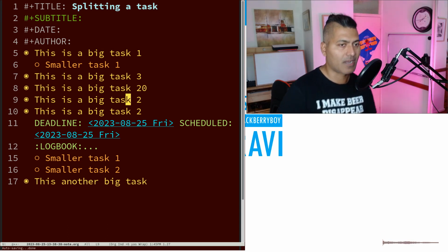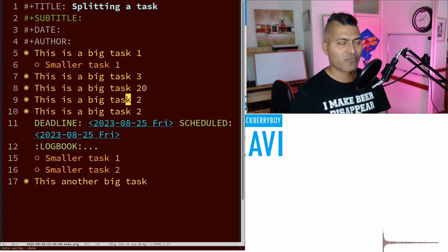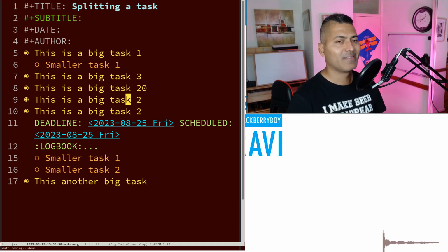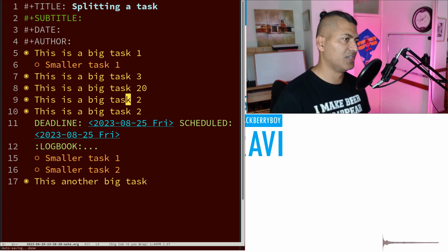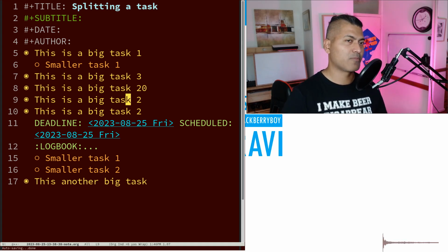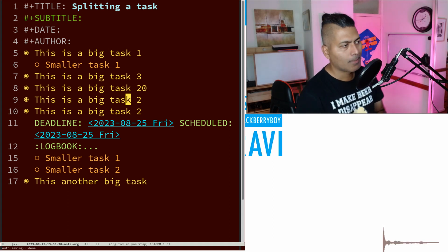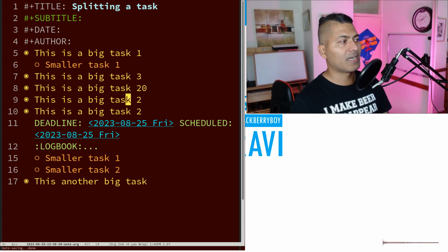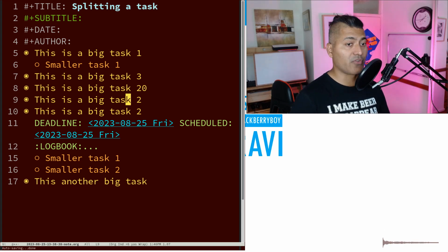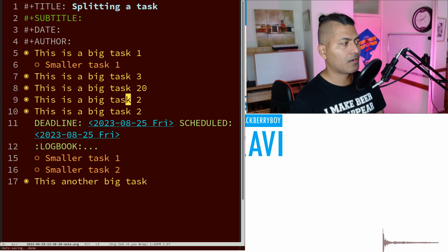Now in Jira, there is a hierarchy, right? You have epics, you have stories, and you have subtasks. If you know that eventually this high level planning will go to Jira, and I have to create the list of epics, I don't really do it in Jira directly, because it is much quicker to do it here. Then when I have some structure, I can just import it in Jira. In that case, I need the topmost level as the list of epics, and that is where doing these things is convenient.